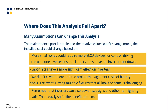The analysis can shift in some scenarios. More small zones may require more ELCDs, driving up per-zone inverter cost; large open-office zones drive it back down. Higher labor rates have a more significant effect on inverters, though the advantage still falls to the inverter even at high rates. Project management costs for battery packs — managing multiple fixture types that look the same but act differently on site — can also be a real challenge.